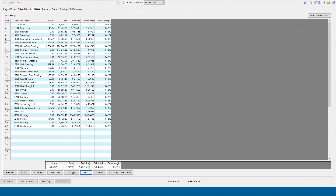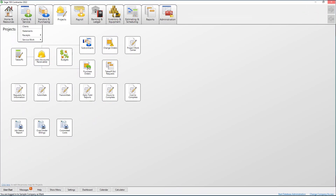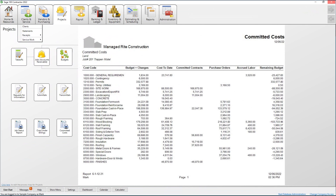Each item in the estimate will also be assigned to a task. This is used for the scheduling module inside Sage 100 Contractor. Scheduling is included in the base subscription with Sage 100 Contractor. The detailed integration of Sage 100 Contractor Basic Estimating will save you time and money. Because of this integration, information will be available at your fingertips like never before.